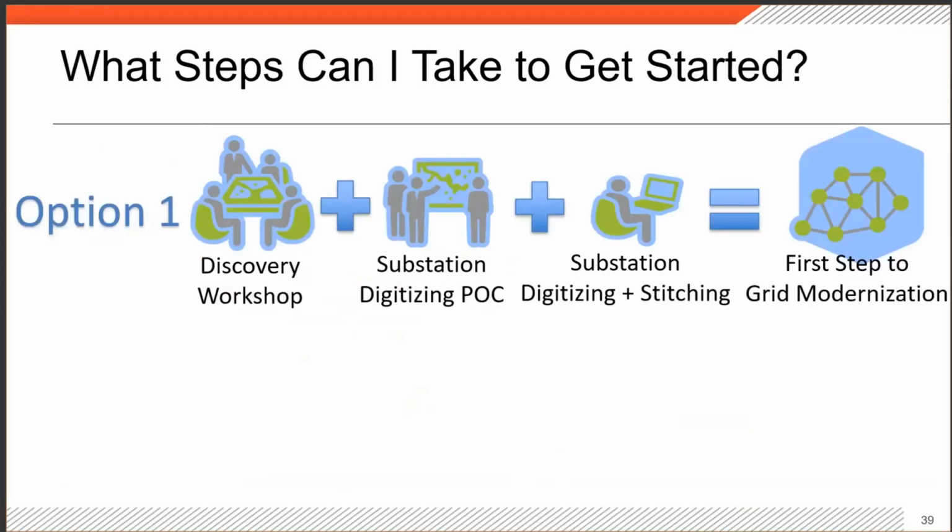If your organization is pretty nimble and allows small proof of concept projects, option 1 might be a good one for you. It's pretty simple. We hold a discovery workshop to confirm EMS and ADMS modeling within the substations and validate requirements and demarcation points from transmission through substation to individual feeders. This workshop will focus on the data required to drive the advanced applications that a customer intends to deploy.